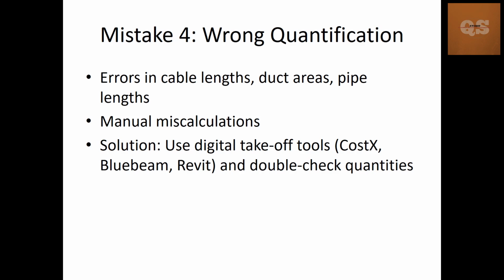Sometimes we would have completely missed out a drawing. So a proper review is required, and some mistakes which we cannot find out, our colleagues or the person who is reviewing our BOQ can find out. So that is one of the solutions that we can use to avoid wrong quantification.